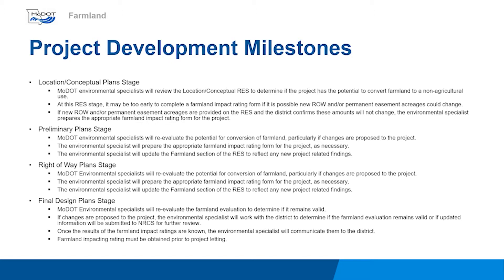For projects requiring an Environmental Assessment, or EA, or an Environmental Impact Statement, or EIS, the Design Division and the district will determine when to begin this process, because an RES is generally not submitted for these NEPA classifications until later in the NEPA process.